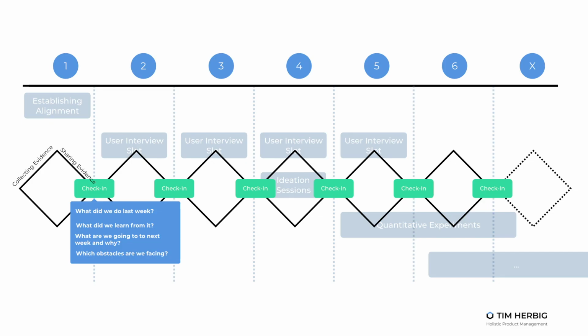You want to be clear about the insights and the decisions you want to make as soon as possible and on a continuous basis. This is why adding something I like to call discovery check-ins to your discovery schedule is extremely vital. A discovery check-in is also something you need to accommodate in advance when putting it into the schedule, because most likely this involves some stakeholders or C-level management to make decisions. And you probably know how hard it is to find time in their schedules.